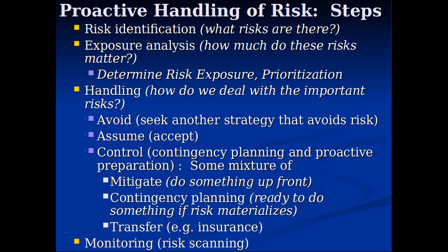Okay, this comes about. Suppose that someone gets sick in our project. We know that whatever position they're in, we have a backup person for that position. Someone has been shadowing them, or someone has been doing pair work with them, someone has been briefed by them on an ongoing basis to take over.